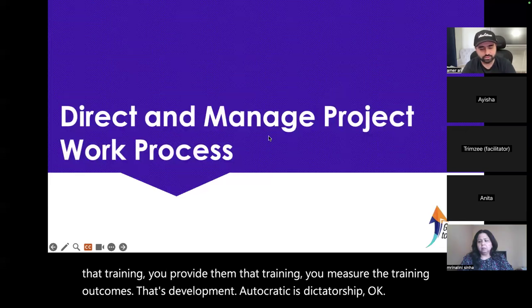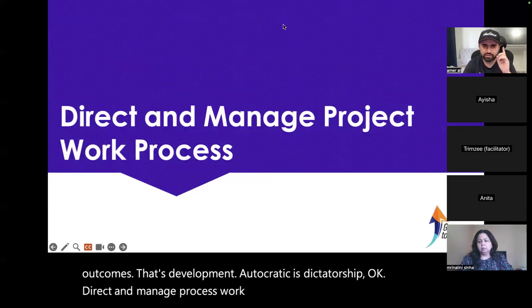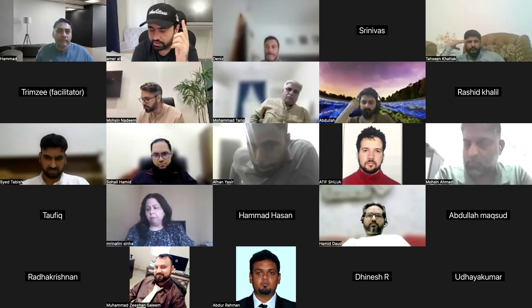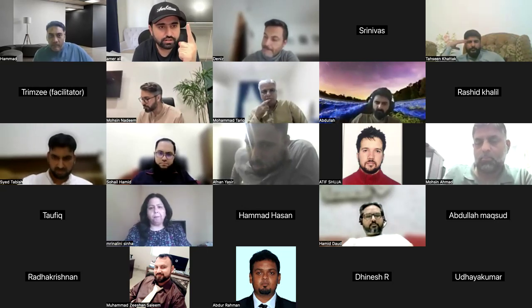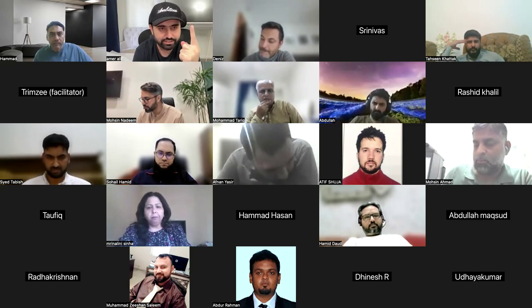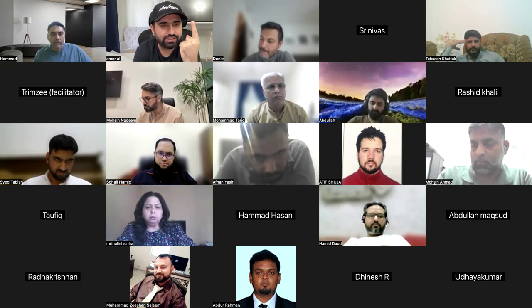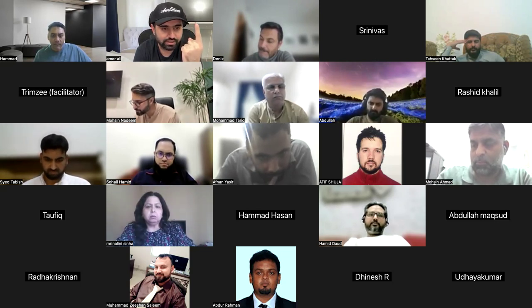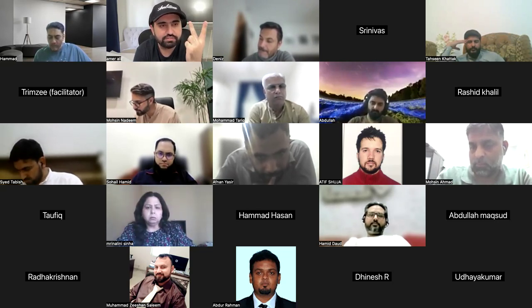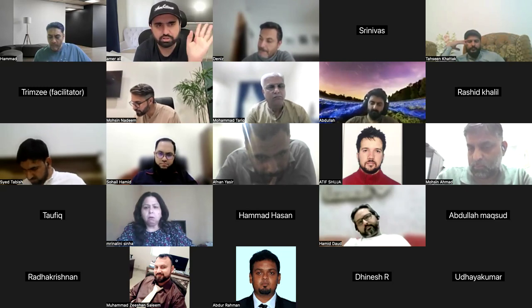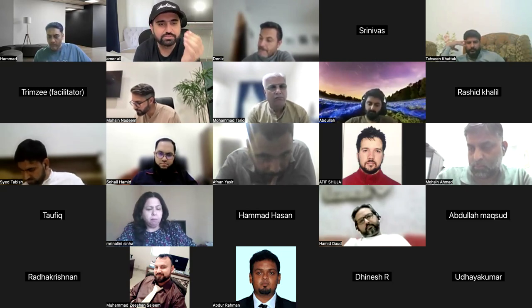Direct and manage process work. Write it down, this is a very important thing. There is only one process in which a project is created, in which a project is started. That is called develop project charter. There is only one process in which work is done, direct and manage process.